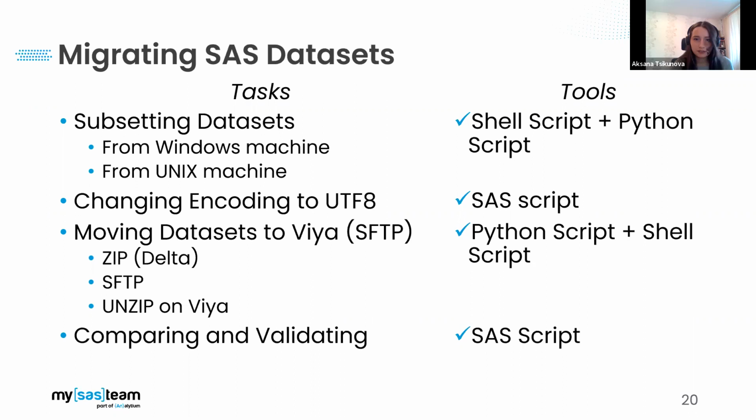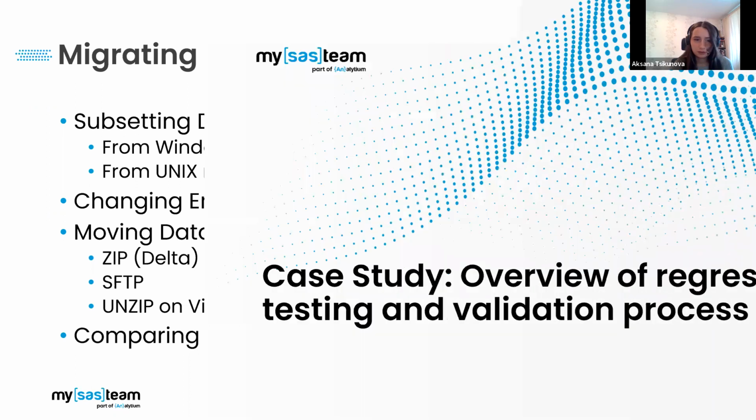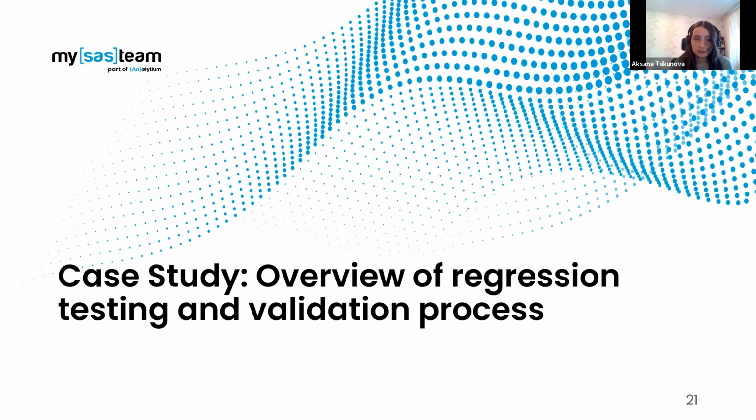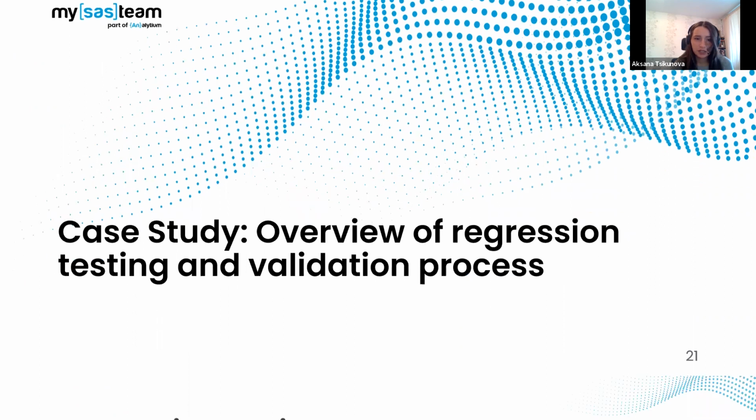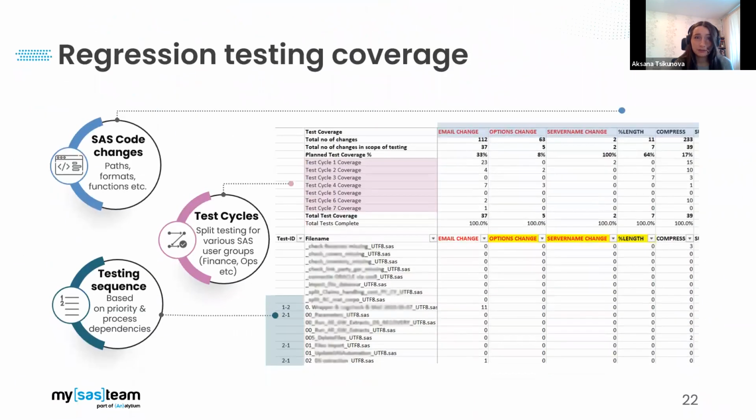Thanks, Pavel. So we're just going to talk a little bit about the regression testing and validation process. This process might seem easy, but it might require even more time than the migration itself because of the involvement of different teams and different processes for testing.